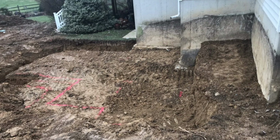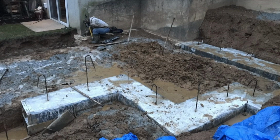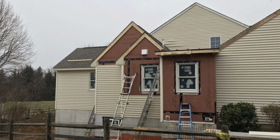And the second step we call project development. And project development is the process of preparing a project for construction. And it involves working now with the interior designer to choose all of the finishes and all the things that go into creating a finished project, along with developing the schedule for construction and lining up the resources necessary to build the job. And then we enter the third phase, which is actually the construction process itself.